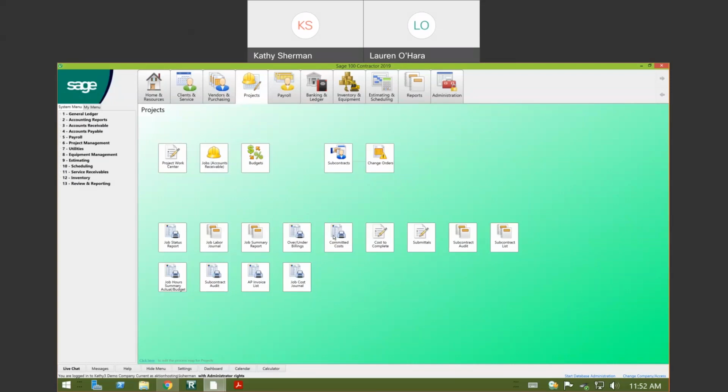So that way it gives you the ability, if it's not fully burdened, i.e. payroll hasn't been run yet, you can enter a rate and factor in an estimated burden rate, just to see what that looks like prior to the payroll being run. So a couple of different ways to do that, but those are the two main ways. So hopefully that made sense.